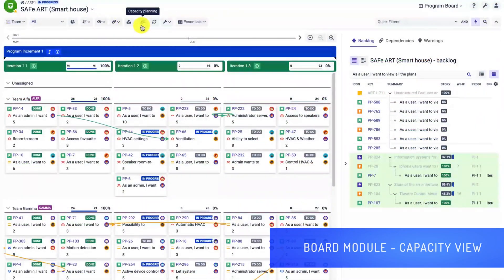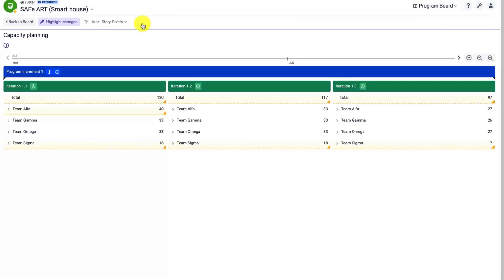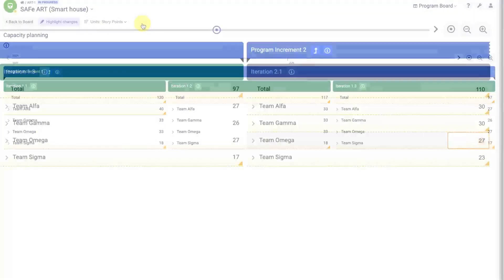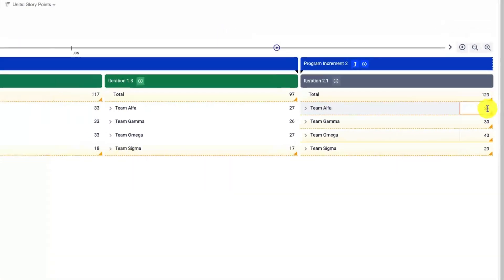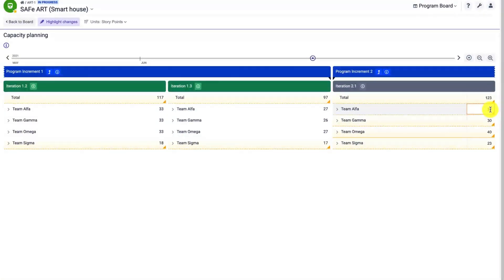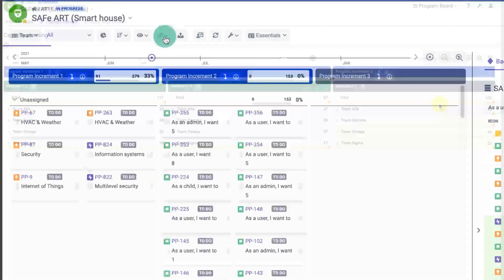The board module has an additional capacity planning screen. The default capacity values are the same as in the resource module but you can override them easily. Just double-click on the values to edit. You can set the capacity for each of the members or for the whole team.